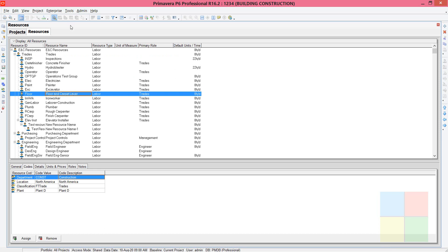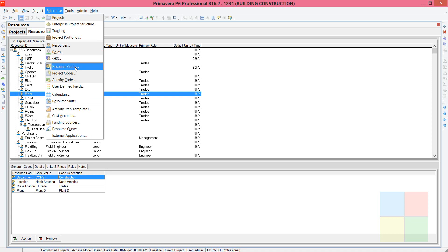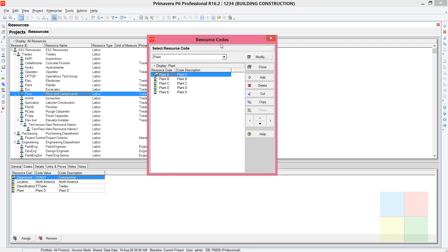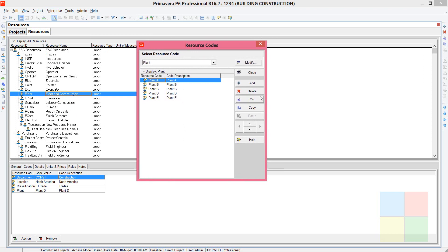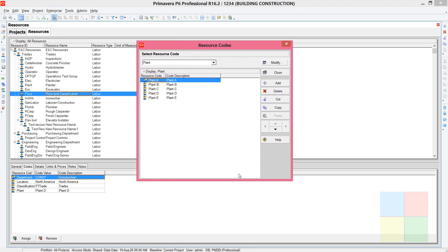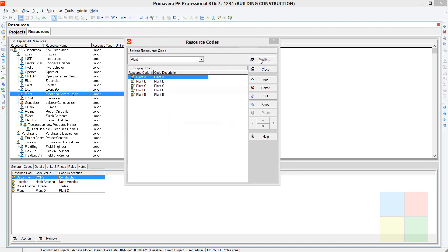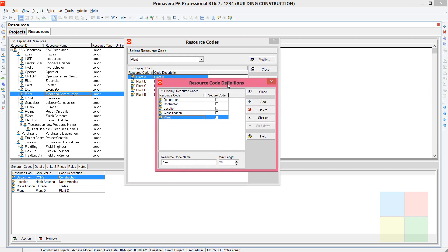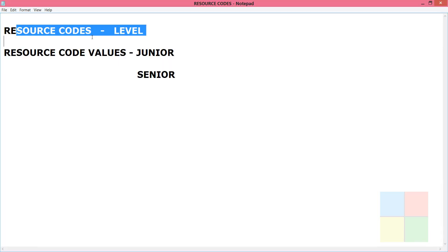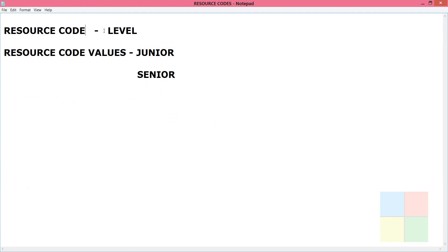To create the resource codes, go to Enterprise, then Resource Codes. You'll get a dialog box. Then go to Modify. In this new dialog box, click Add and here we will create the resource code — specifically the resource code level.